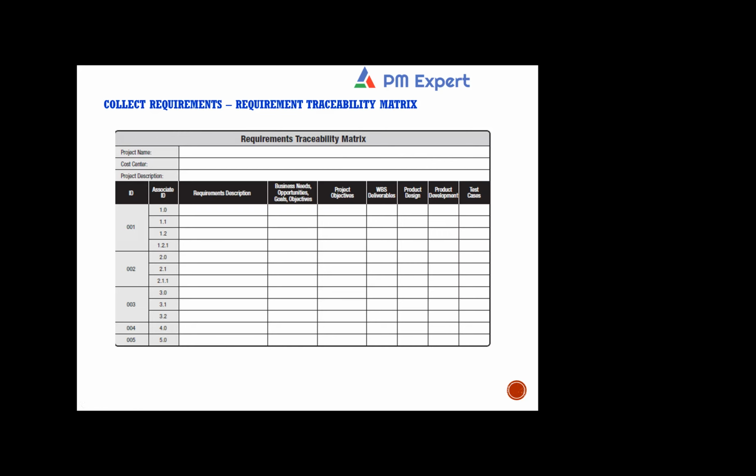This is to ensure that every requirement is included in the deliverable, it is properly designed, it is considered while designing, and there is a source code for development as well. It is mapped to the source code, the relevant program as well. This is one format of traceability matrix. It is more exhaustive and elaborate.